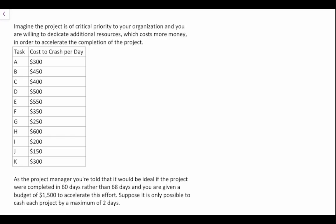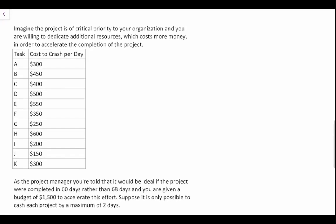When looking at project crashing, we want to identify which items cost the least amount of money to crash in order to accelerate our timelines. Importantly, those items have to be on the critical path to have any impact on the completion of the project.